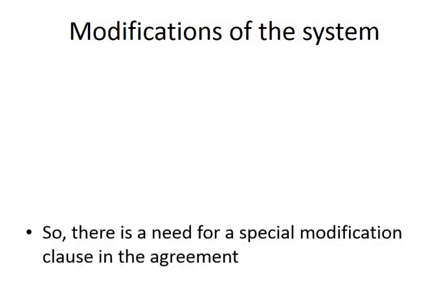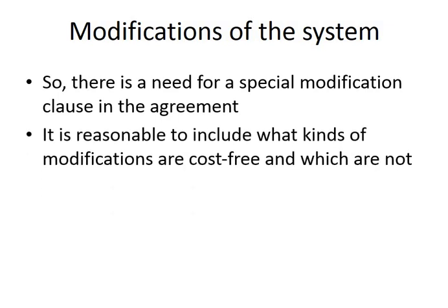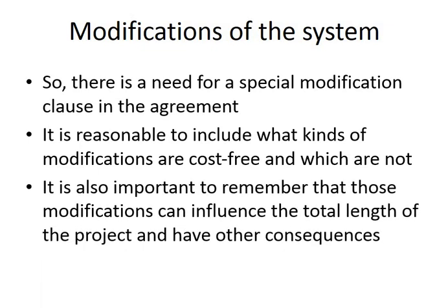In case of, let's say, most of the projects, there should be some kind of modification clause in the agreement. So yes, the investor can get more, but he needs to pay for it. And there are some other consequences to the situation, like the project can be longer.